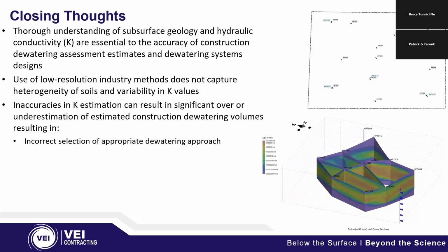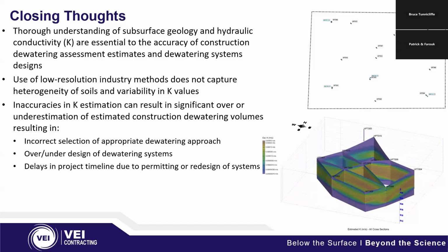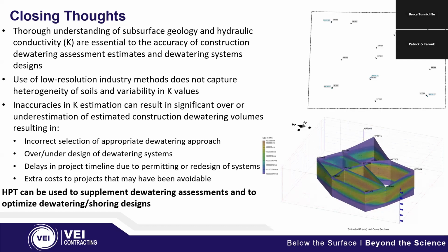So incorrect, it also could point you in the incorrect selection of your dewatering approach, over or under designing of your dewatering system. And that ultimately will delay your project timeline because you're going to have to re-permit or redesign the system and rescope everything. That's all to say these are extra costs to the projects that could have been avoided in the first place.